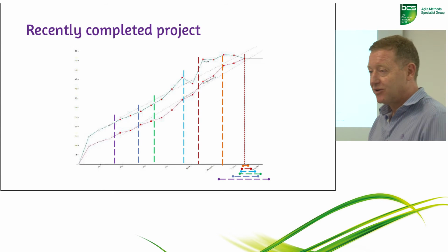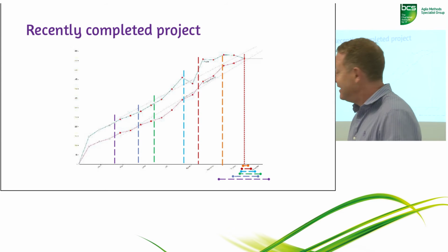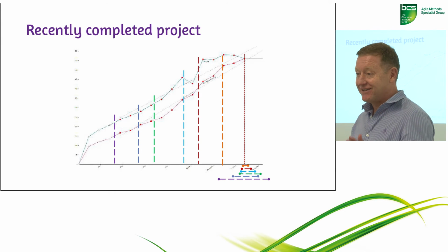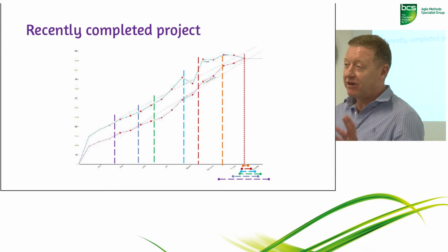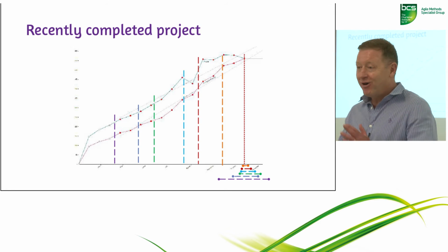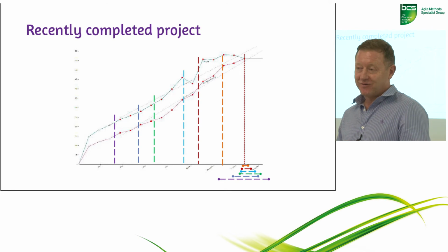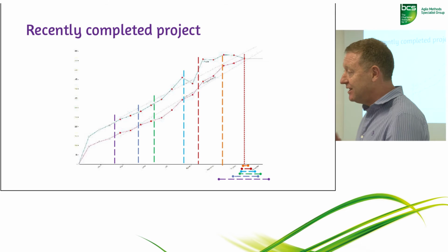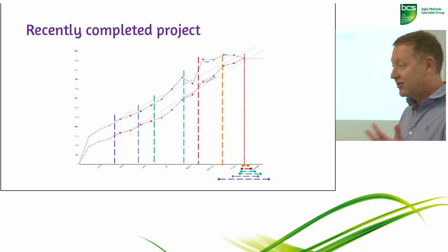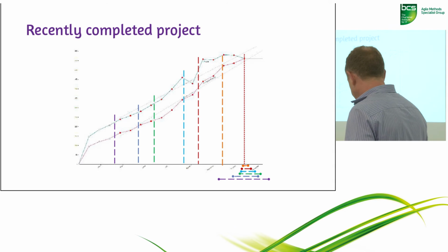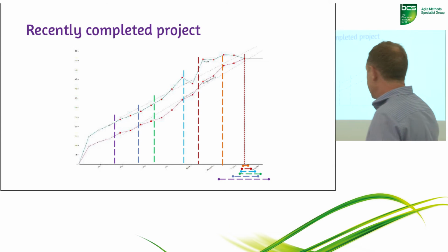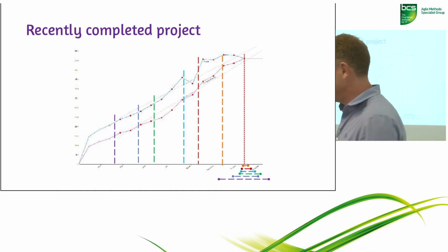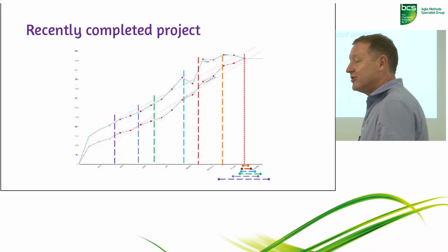Now, this is one of the key things about probabilistic forecasting, which is what this is, that we're always talking in ranges. We're always talking about a range of dates. And that is actually quite a point of clarity with stakeholders, that we don't know whether we're going to hit the 30th of September, but here's the likelihood, here are some probabilities for you to work with. So that leaves space for conversation and exploring of options and so on. And then we ran it again and again and again, because that's the nice thing about mathematical models. You can just run them as often as you want.